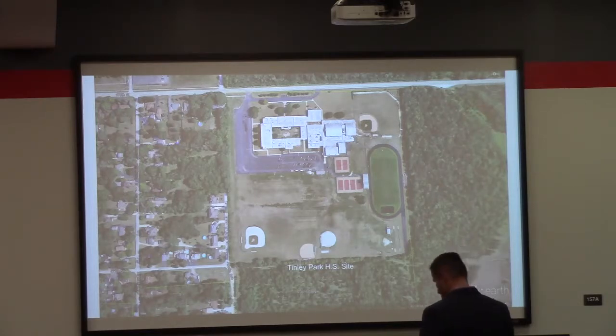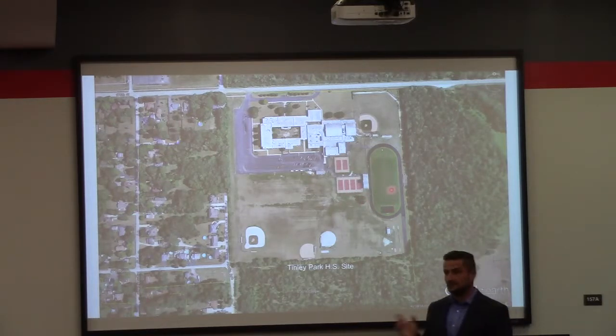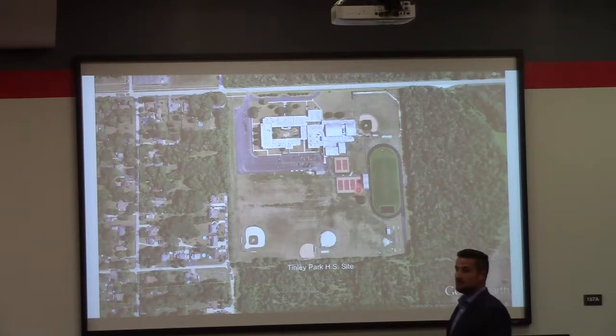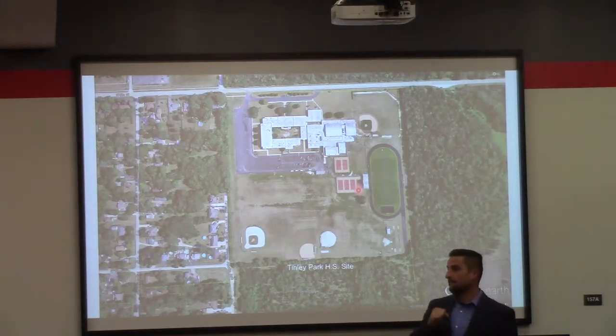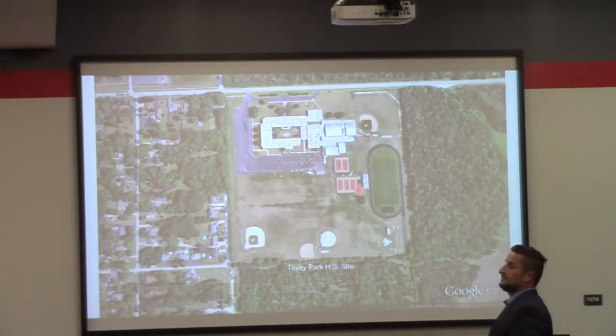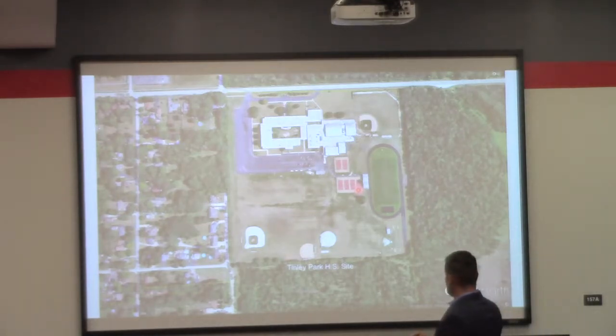Yeah, so our approach to this was, you've got a relatively flat area. We know that we have to dig about 27 inches deep underneath the full field to create the rock reservoir. What to do with all the spoils? We're building a building pad, or we're looking at building a building pad here. Residual soil was looked at to increase those elevations to separate the building from Lake Tinley. It was a good place to save export costs. And so the export costs for that soil that was placed in the existing tennis court area more than paid for the courts.